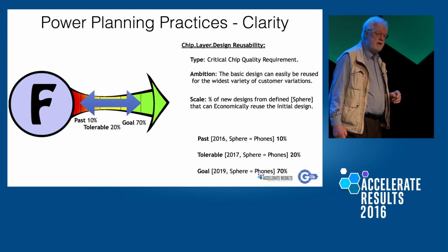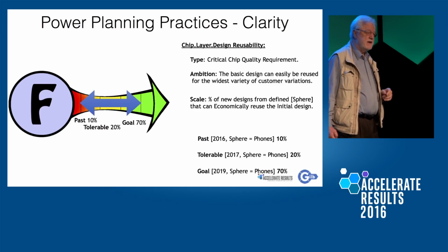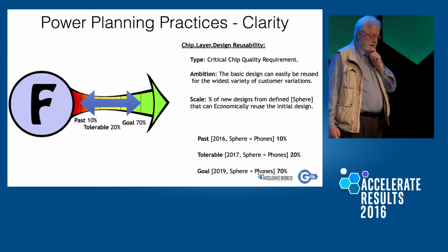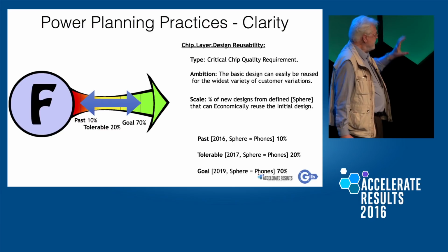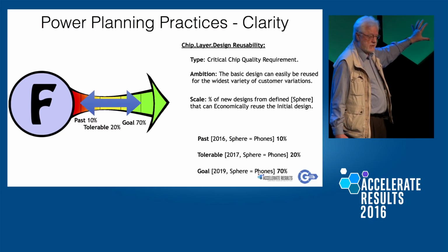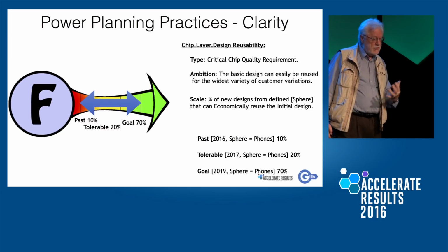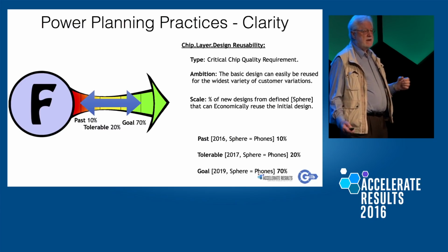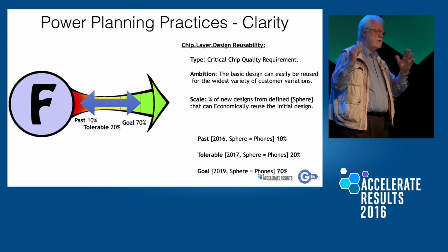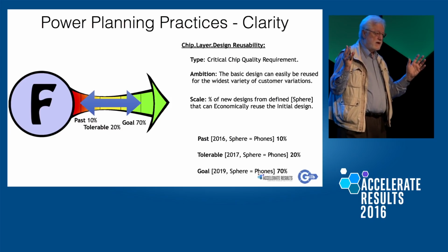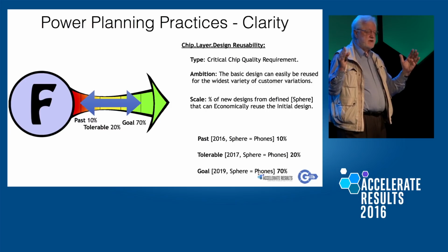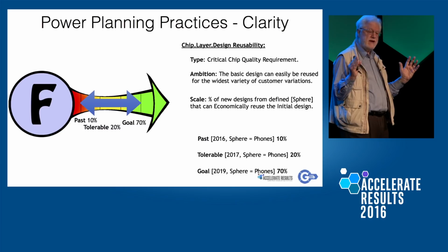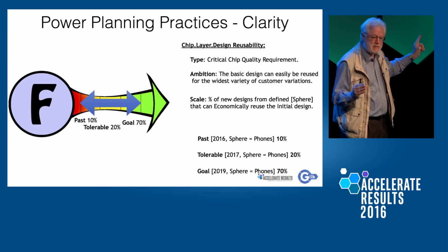I was just reading a paper by Terzakis of Intel, we're going to look at him a little bit later, and he's using these methods of quantification for the requirements, and he's using some quality control methods, I'll show you, that we've also taught. And he makes the point that in going from a generation 1 to 2 of some products at Intel, they shaved off the time, which was like 540 days, down to 400 days. They shaved off 140 days by using these methods specifically.